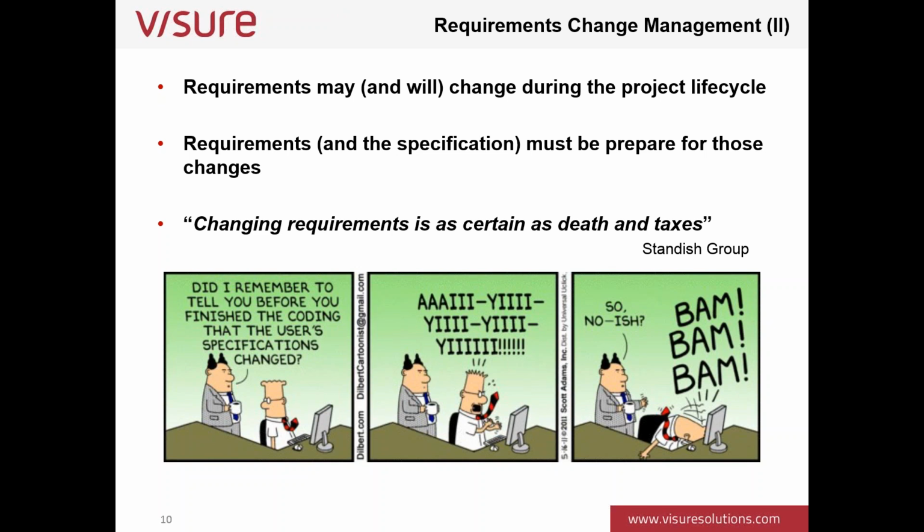In fact, in one of our courses, one of our first exercises is to analyze the situation of a project that has been ongoing for 2 years, and we have the original specification from 2 years ago, and now we have to accept or decline the system based on that specification. Basically the idea of this exercise is to realize that there is no way to accept or deny that system based on a specification 2 years old without any update to it, because the requirements have changed for sure during that time.